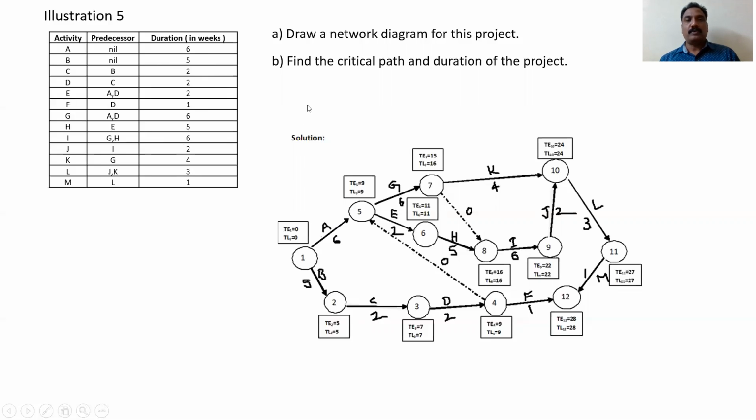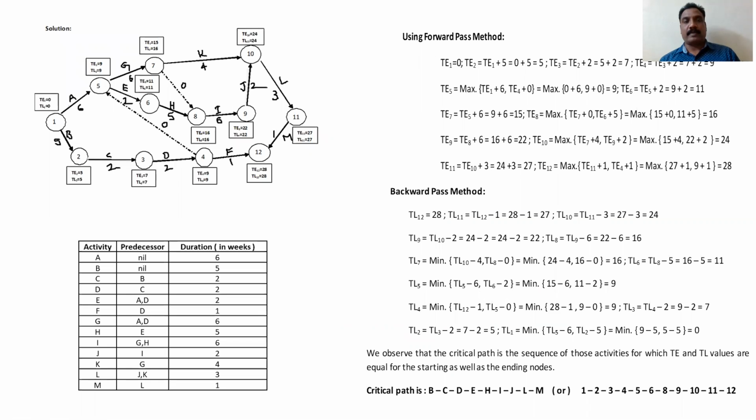Now, how to find the project's duration? First we find it based on the forward pass method and the backward pass method. So next slide, for reference purpose, I have taken the same diagram as well as the problem. See here, as I already told you, TE, that is earliest times, and latest times you have to calculate.